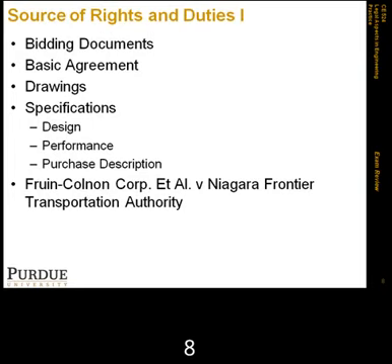There were also unit prices provided for stem leaks. If you provide the unit price for stem leaks, it means that water tightness is not guaranteed. You're going to follow certain requirements, and it could achieve the water tightness or not.